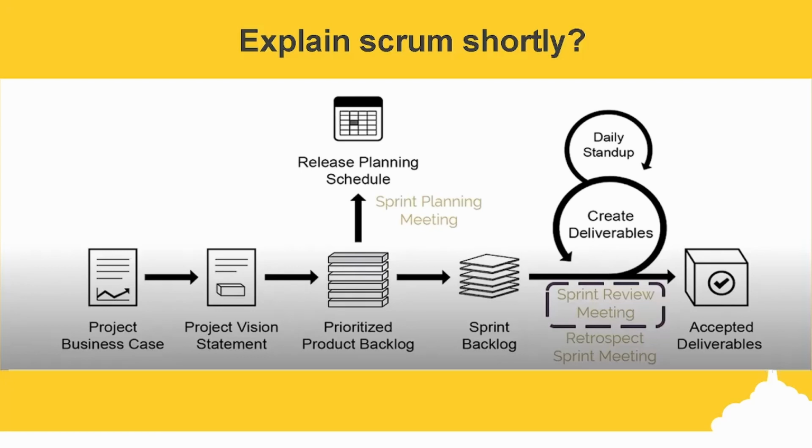A key strength of Scrum lies in its use of cross-functional, self-organized, and empowered teams who divide their work into short, concentrated work cycles called sprints. The Scrum cycle begins with a stakeholder meeting during which the project vision is created. The product owner then develops a prioritized product backlog, which contains a prioritized list of business and project requirements written in the form of user stories.